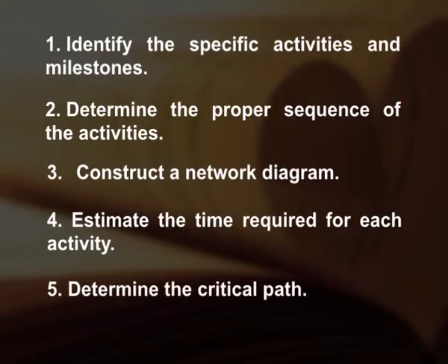Determine the critical path. The critical path is determined by adding the times for the activities in each sequence and determining the longest path in the project. The critical path determines the total calendar time required for the project.